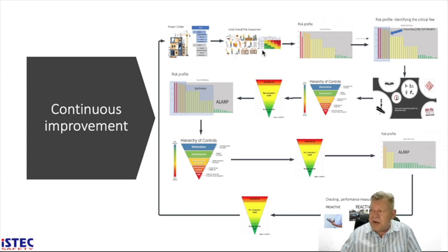I need to look at my initial risk assessment, because maybe I missed hazards, or I underestimated hazards, or underestimated the likelihood of them, or the controls that we suggested were not effective. I will again rank my rating. I will manage them down through specialized risk assessment tools if required, applying the controls, reducing them, and so we go around and around and around. And that is simply the process of risk management.